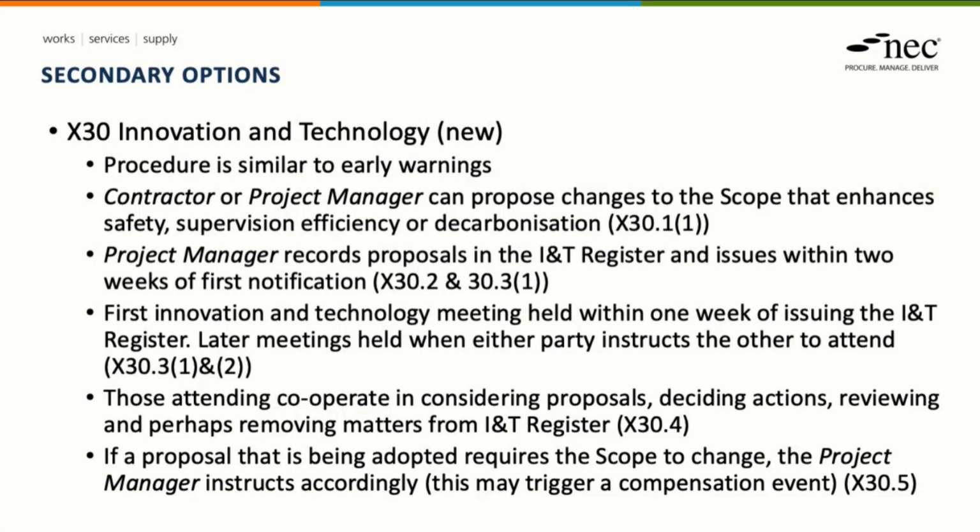The provisions are similar to how early warnings are managed, in that either the contractor or the project manager propose changes and the parties meet to discuss the changes and work through the detail, and subject to what they agree in the meeting, or maybe there needs to be more than one meeting, the parties will move ahead with the change.